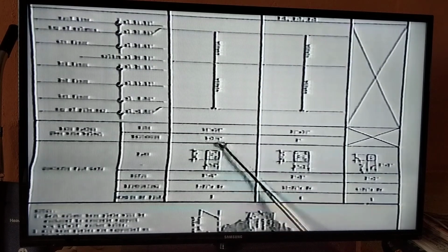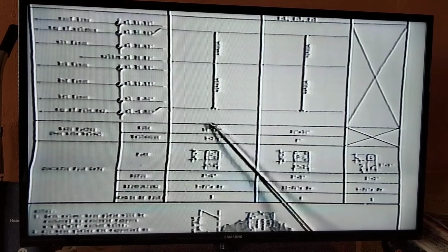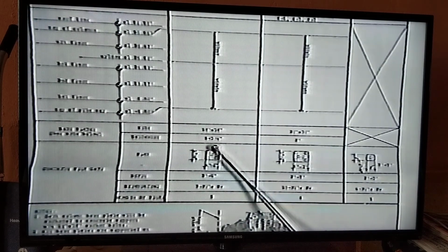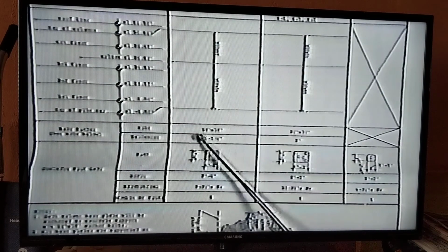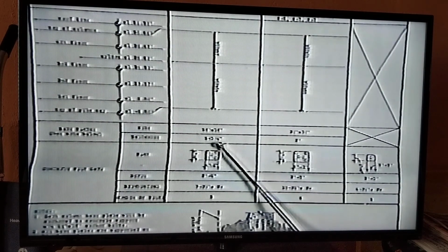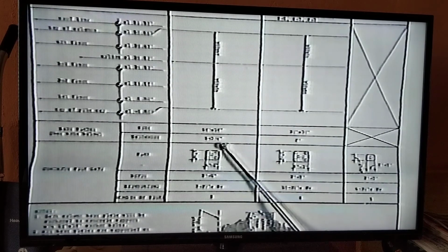So we either want to work with inches here, which would be awkward, or we want to go 3 or 4 decimal places if we're going to convert this to decimals. So we would find out the volume of steel in the base plate, and then we would multiply that by the weight of 1 cubic foot of steel, which we would find in Walker's.